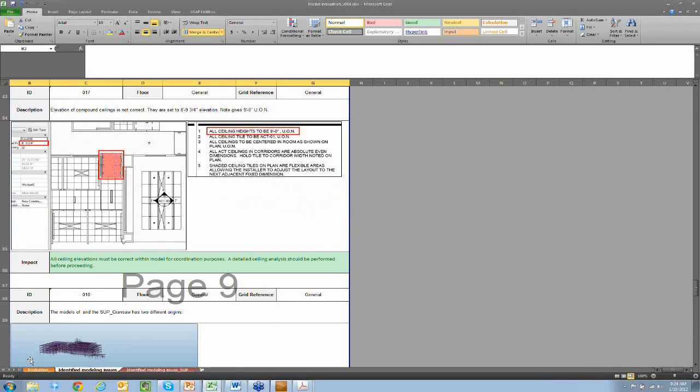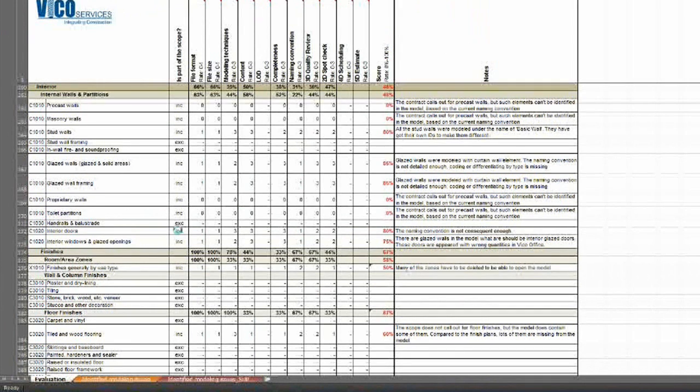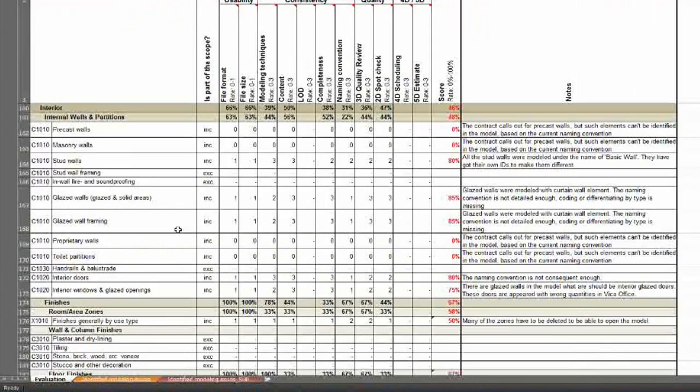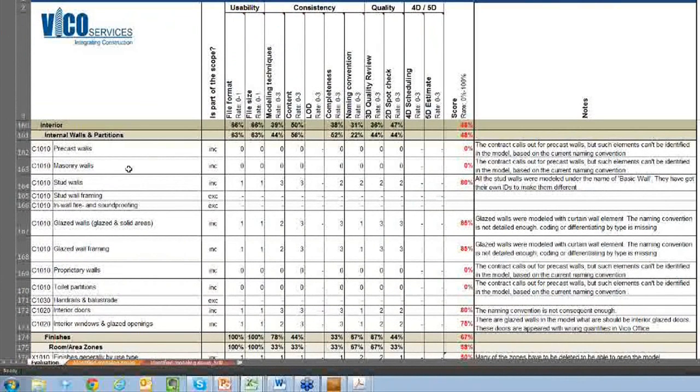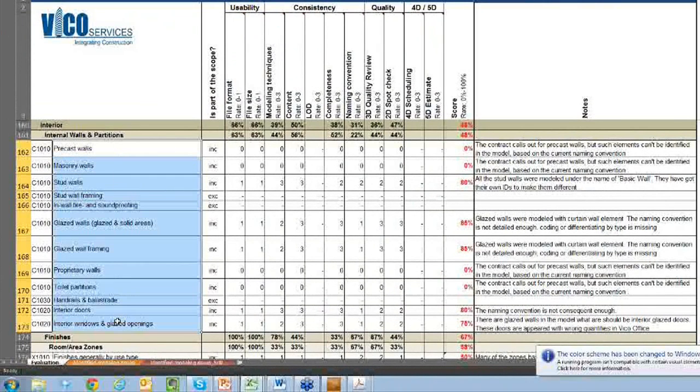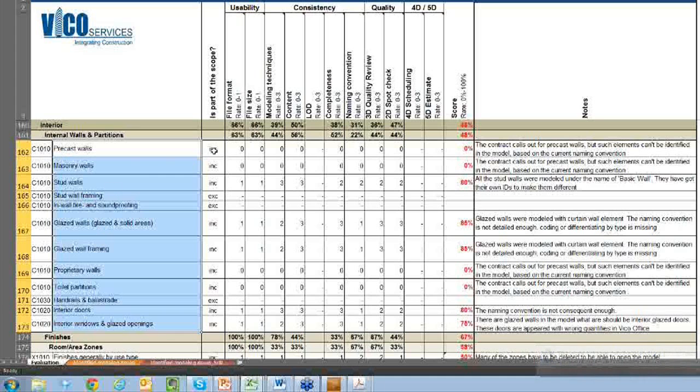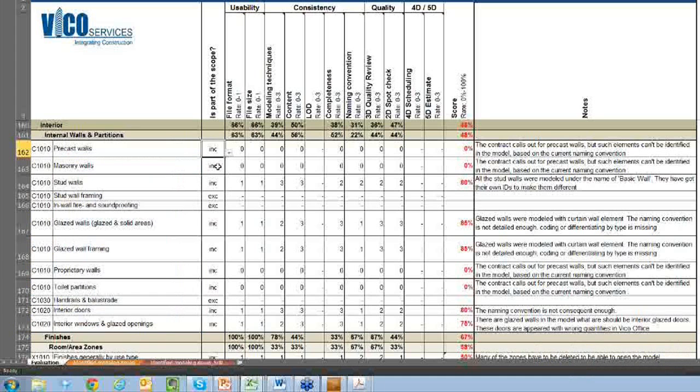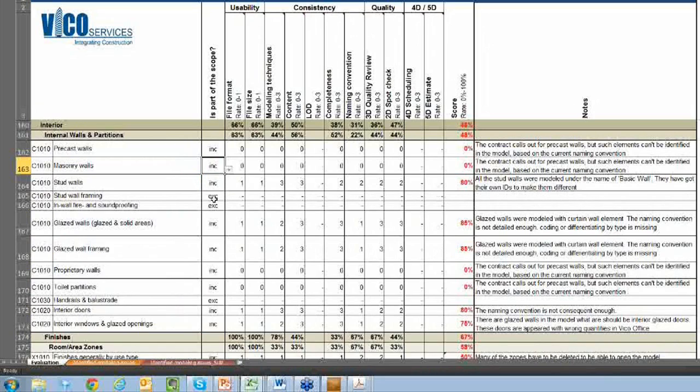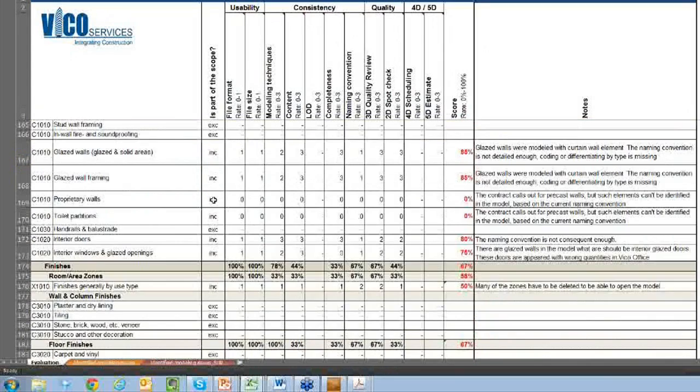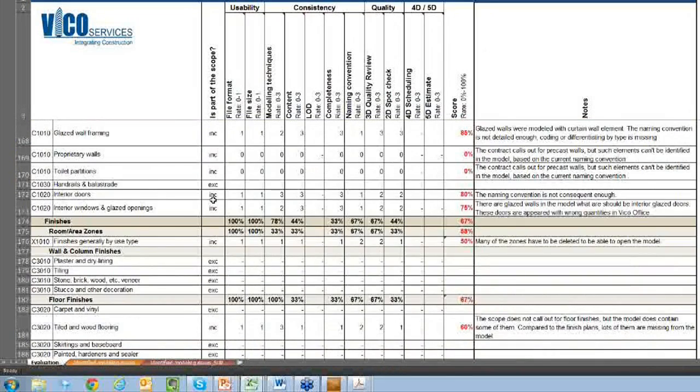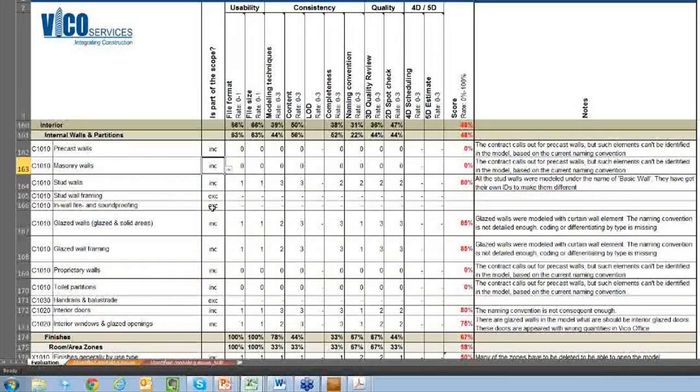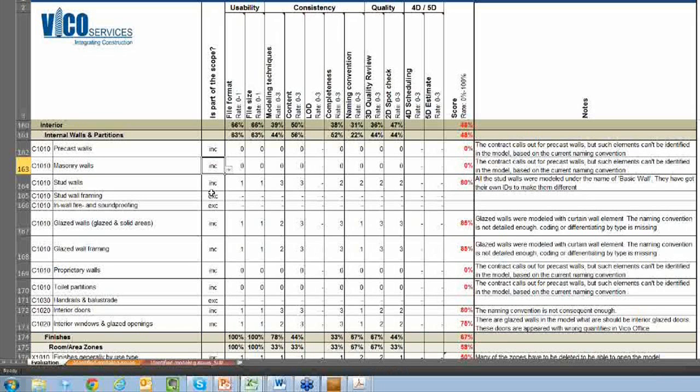So if I go to this document here, when I say QAR, what you see here on the left is a standard list of elements that VECO uses for all of our modeling scopes and project activities. We work with the client to see what's included and what is not included. We go through line by line, assess the project needs, and see what 3D elements may need to be in there for a proper model, whether it's for coordination or whether it's for 4D, 5D.